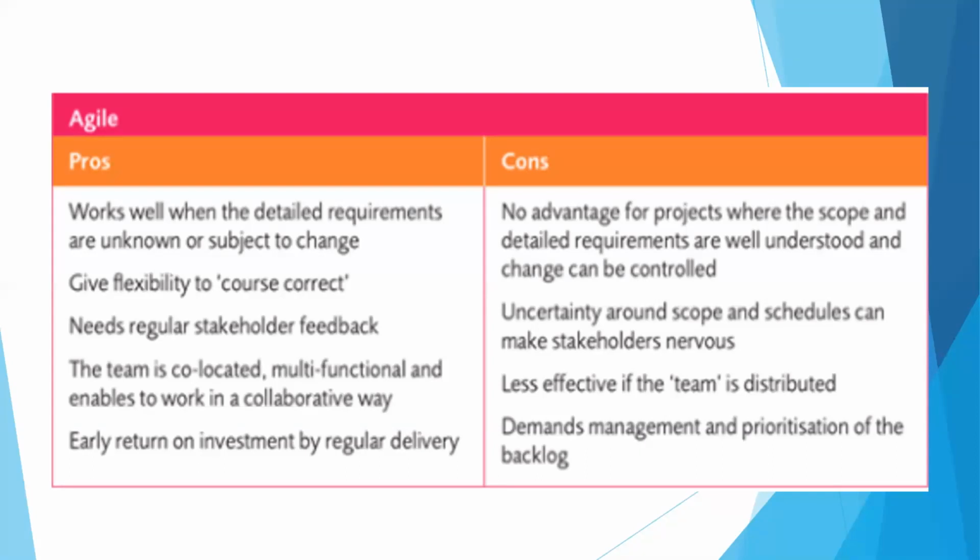Well, agile is not good when, on the cons, there's no advantage for a project where the scope and detailed requirements are well understood and change can be controlled. So when nothing will change and you are not going to allow inputs, then agile is not the best for that kind of delivery. It's going to be waterfall.